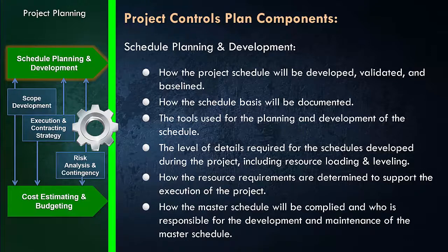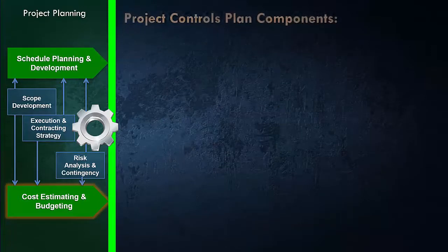And if you are working with different contractors, or if you're maintaining multiple schedules for the project, you need to also mention how the master schedule is going to be compiled and who is going to do that, who is going to be responsible for the master schedule, for its development and maintenance, and how you're going to integrate into the master schedule. So that also needs to be addressed as well.